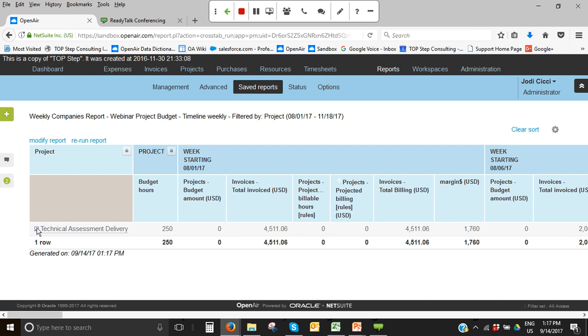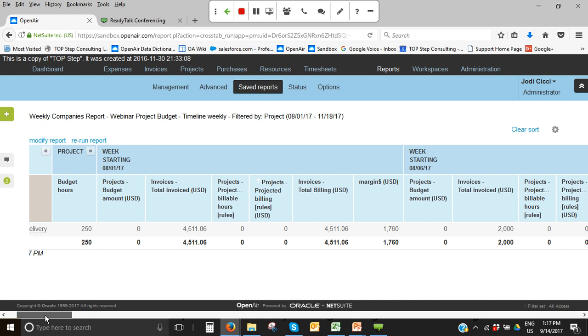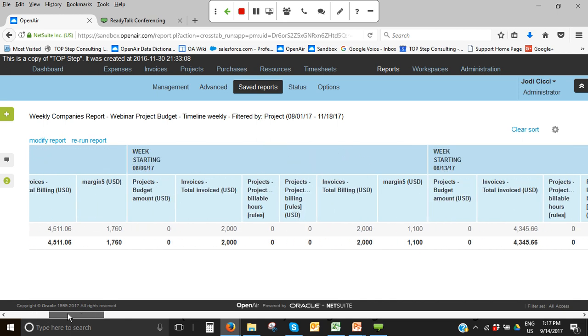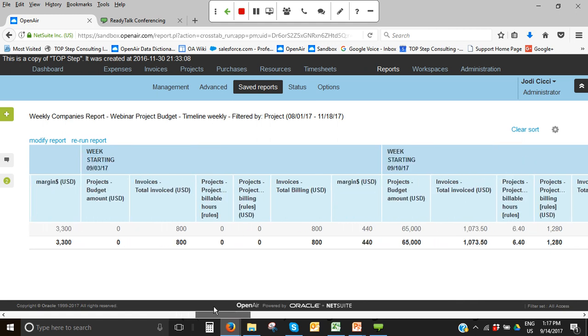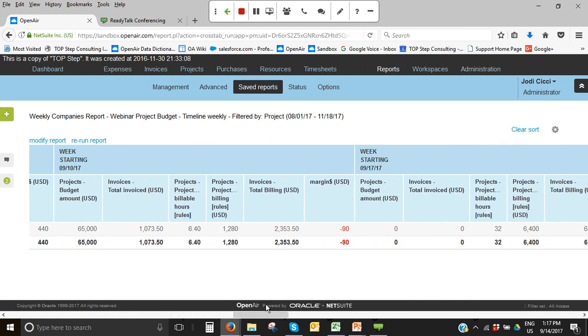The reason I'm showing you guys this is that this budget approach has a slight limitation in the fact that it can't really keep up with a weekly view. You have to keep using inception to date view reporting, because you'll see here week 1 I have no budget. So of course, how am I doing against the $0 budget? I have no budget on the week of the 6th or the 13th. I have no budget up until, you guys guessed it, until the 14th,